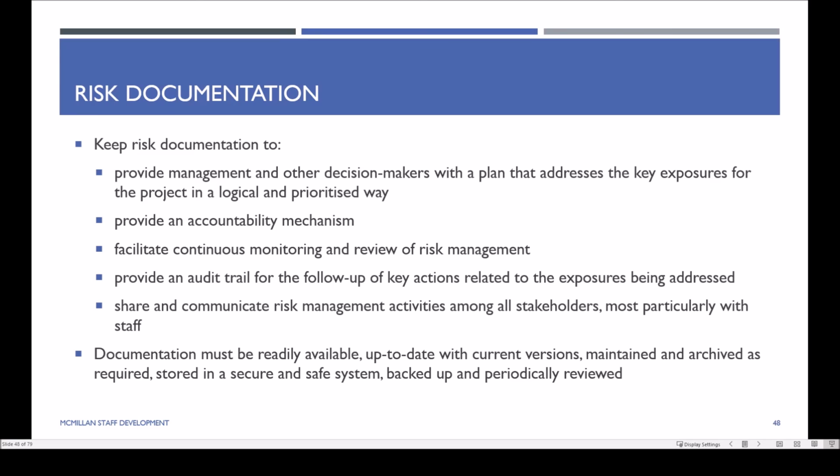And that's broader project documentation, but specifically in this risk context, there is a greater obligation around demonstrating your duty of care around risk. If you're responsible and accountable for a particular scope of the operation and something goes wrong within that scope under your watch, well, then you're accountable for that and you need to be able to demonstrate you've complied with your duty of care. And documentation is really critical to be able to establish that. So if you've got a good solid footprint in form of the documentation to show that you've undertaken due diligence, well then that's going to be a lot easier to demonstrate than if you didn't.